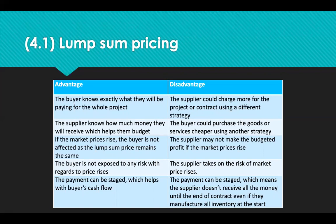What other pricing methods could Bradley have suggested that would have resulted in lower risk for him? The advantages of lump sum pricing are that the buyer knows exactly what they're going to pay for the whole project, and the supplier knows how much they're going to be paid, which helps them to budget. If the market rises, the buyer may not be affected as the lump sum price remains the same, so the buyer isn't exposed to any risks with regards to price rises. The payments can be staged, which will help the buyer's cash flow. But the downside is the supplier could charge more than necessary, and the buyer could purchase the goods or services cheaper using another strategy. The supplier may not be able to make the budgeted profit if the supply market rises, and they take on the risk of market price rises. Also, as payments are staged, the supplier doesn't receive all the money until the end of the contract, even if they manufactured all inventory at the start.